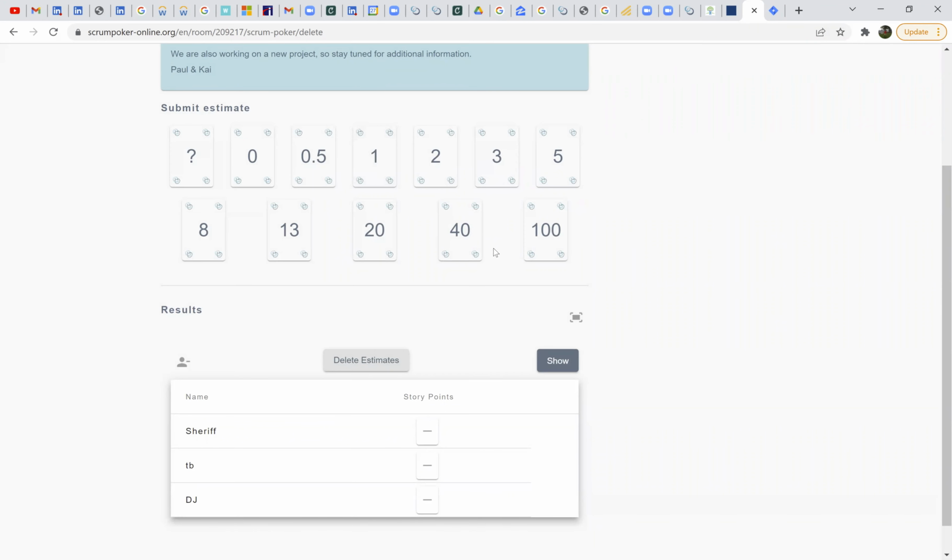When you click on those again and we show it, we go with the highest number. So in this case, you are just 2 developers. But let's say there are 5 developers and maybe 4 go with 3 and just 1 is 1. Even though they're discussing, we go with the highest number.